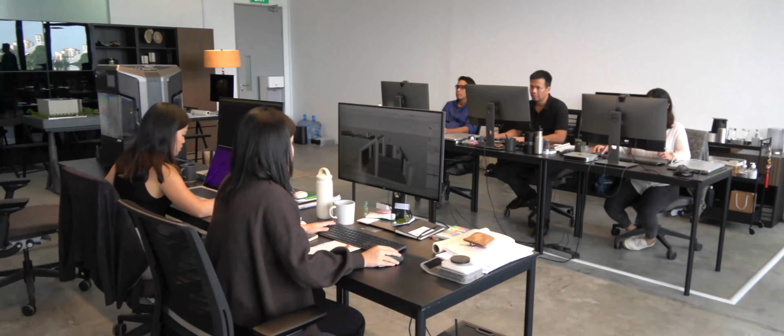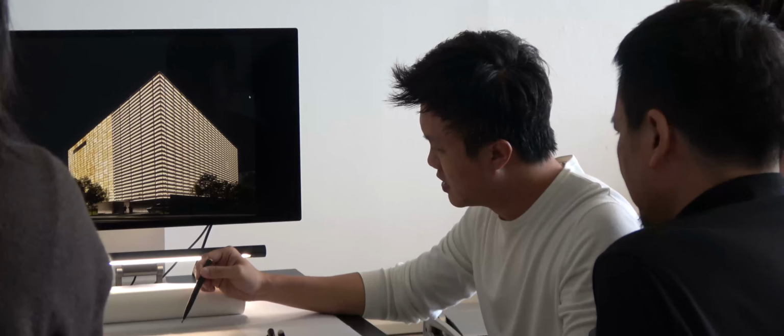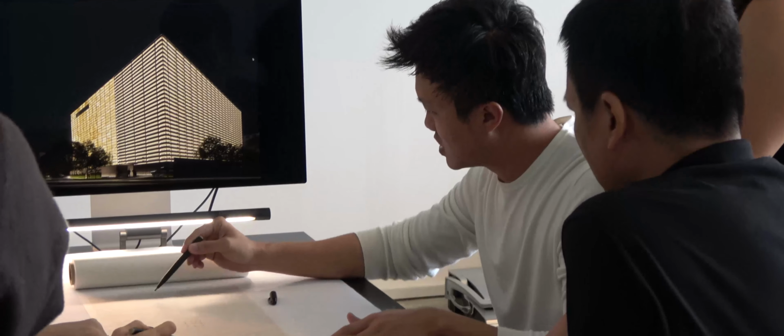We had a team of about 10 people led by Wesley to create the design. And I remember as we were sending out these contracts, it was almost comical. We had boxes of contracts because all the specifications had to be part of the contract and it had to be printed for signature. So it's a long process to get it started. By end of 2021, that process was well in place, and the contractors were basically reviewing the design and coming back with proposals. We had about 10 main contractors in the bidding.